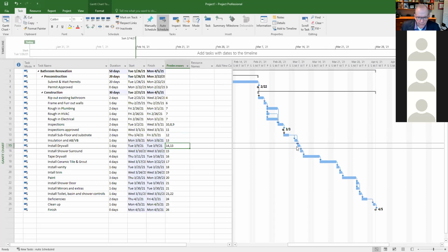Then I seem to have a double link. Like, so you see what's going on here? See how it's linked there? I've got a successor there and I've got a successor here. Well, do I need that there? That would be the question, because I'm saying this gets done, then I do this, right? And I don't need to then say, and then after that, I do this, because then it gets ridiculous because I could do that all the way through. So I don't want to overlink things, that doesn't make sense for me to do.